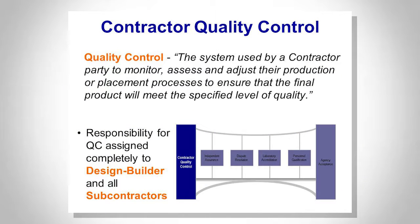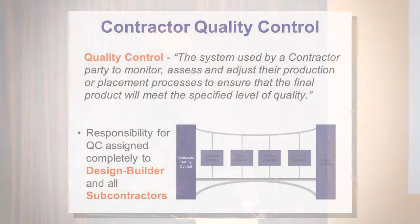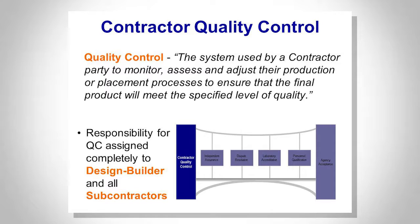As far as contractor quality control, it's the system used by a contractor to monitor, assess, and adjust their production. The contractor is already in control of their own destiny for their product. As you go out and validate them, make sure they're doing it on their own responsibility and not shifting it to you. This extends down to their subcontractors, vendors, and manufacturers, with some level of periodic, timely sampling and testing.